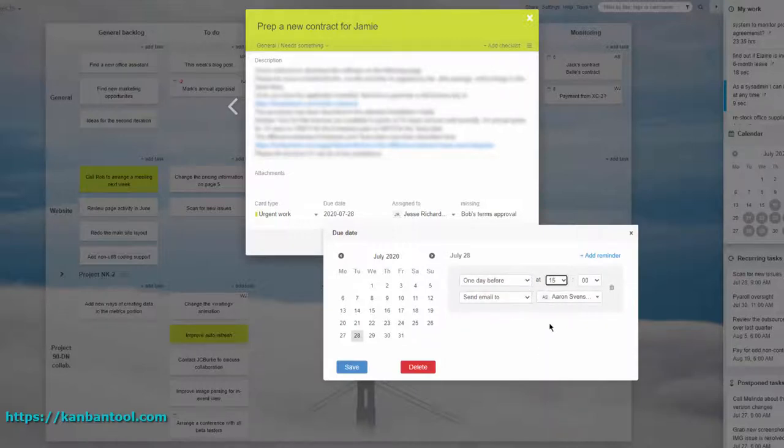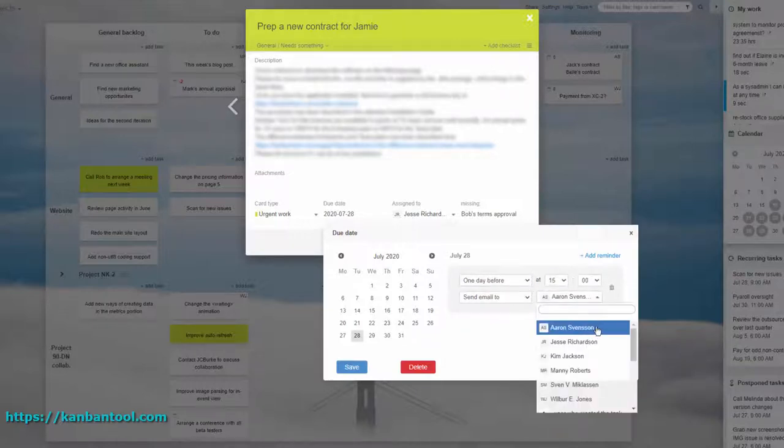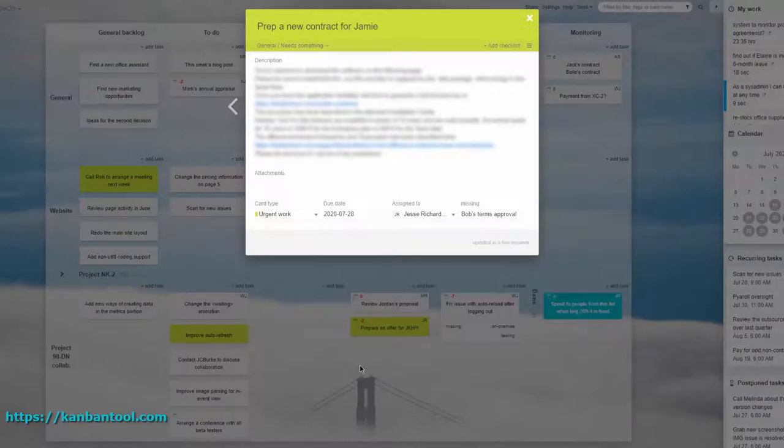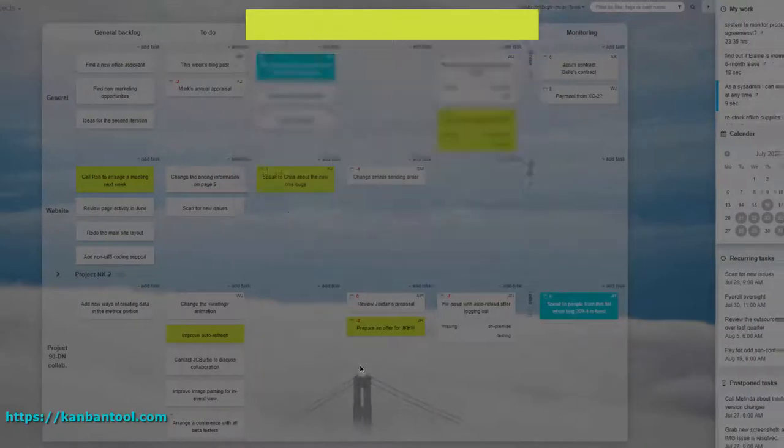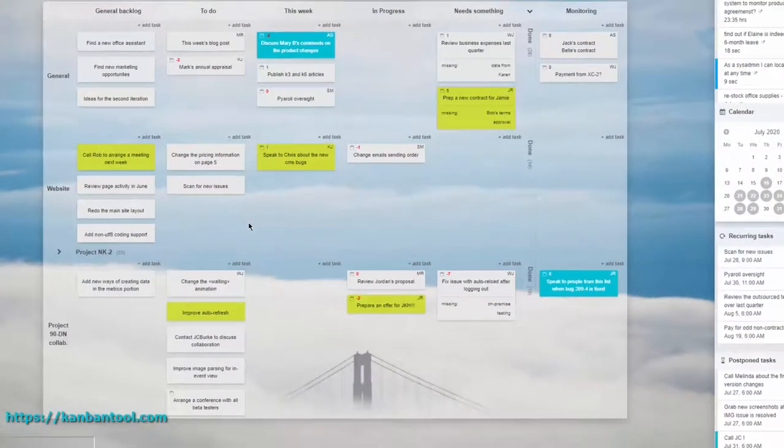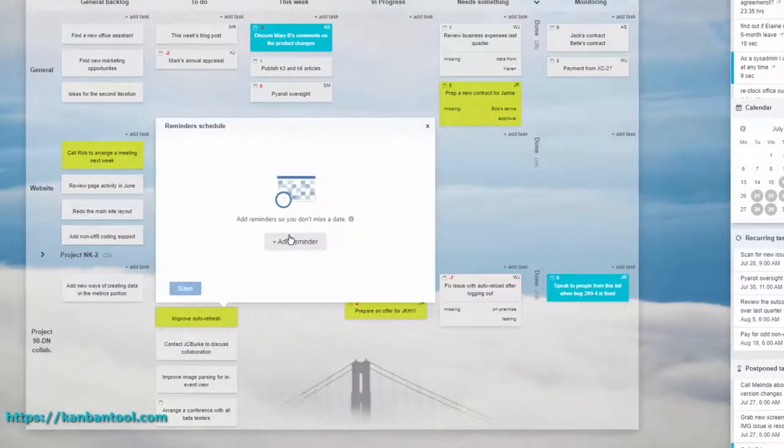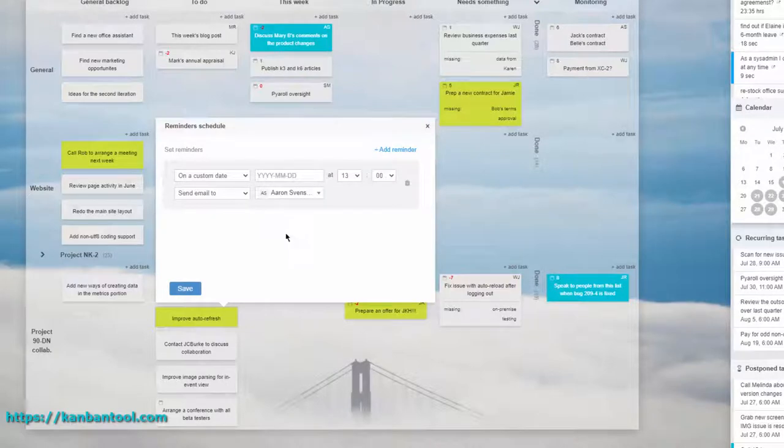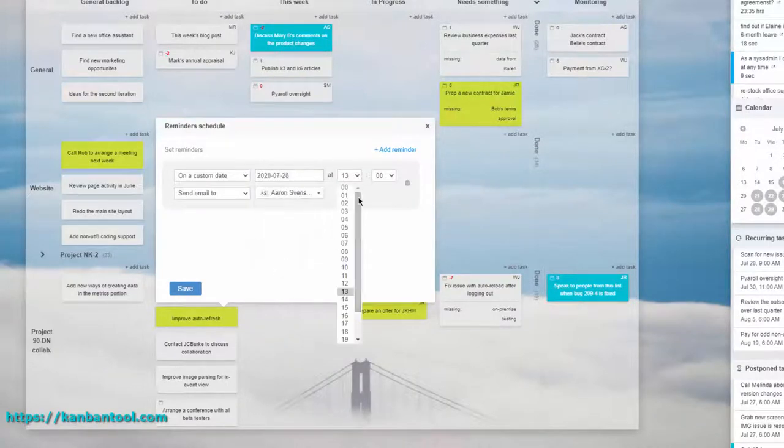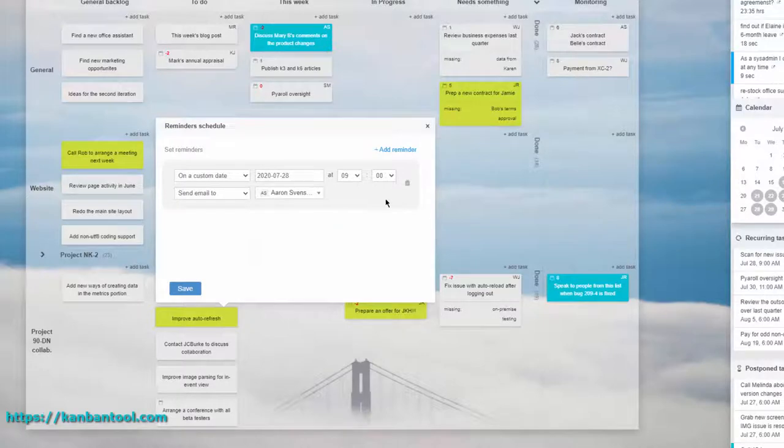It can send you an email reminder about something that you cannot miss, or force a given task to move to a specific column, change its priority, assignment, or color at a set time, making you notice it.